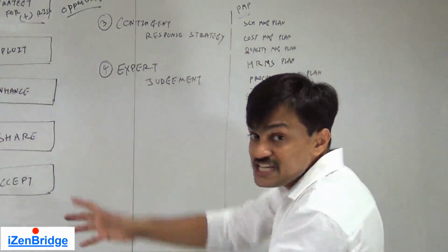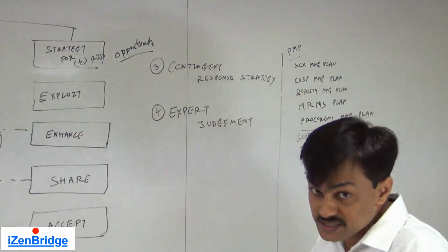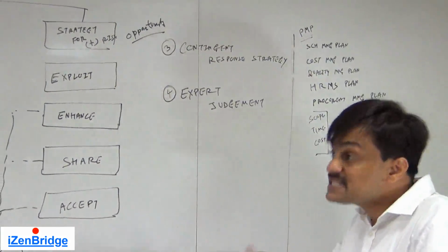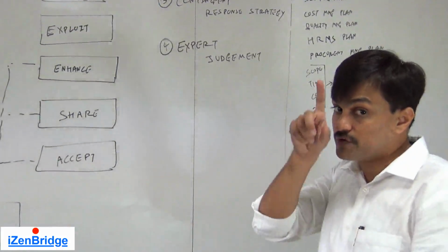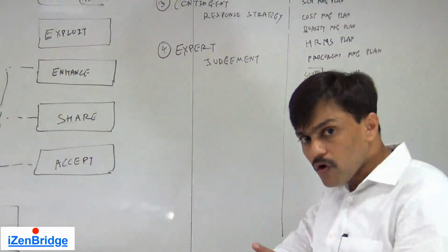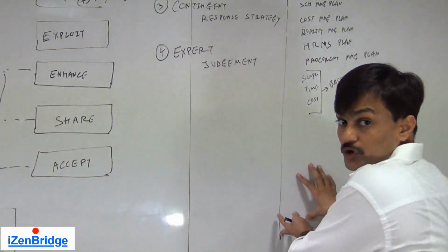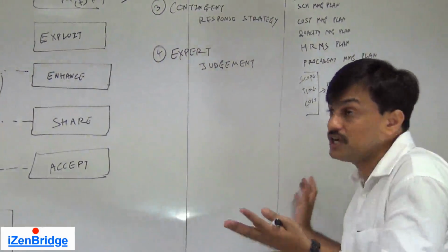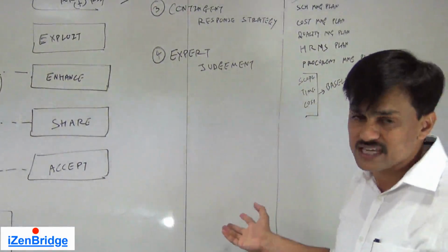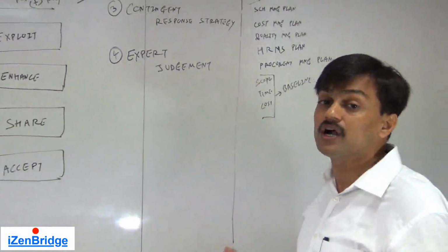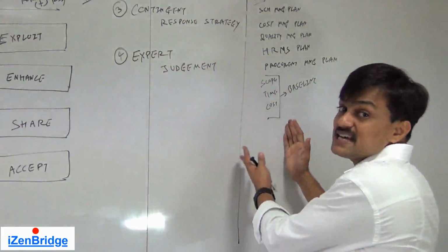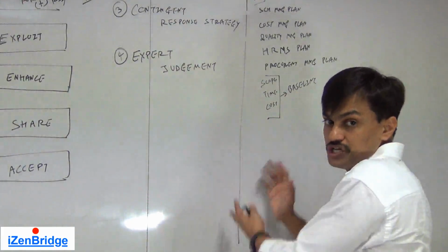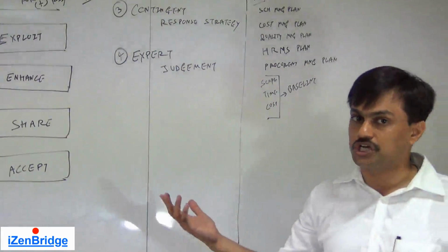And in order to change that, you may generate a change request. Yes, this process can generate a change request. Though a change request is not mentioned as an output, in the PMBOK, inside the project documents update, it is mentioned that this process can generate change requests, and it is natural because we may want to change some of the schedule activities and all these baselines. If the baselines are changing or recommended for changing, it has to go through integrated change control.